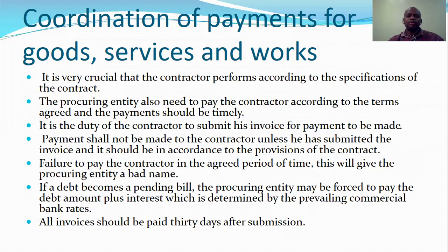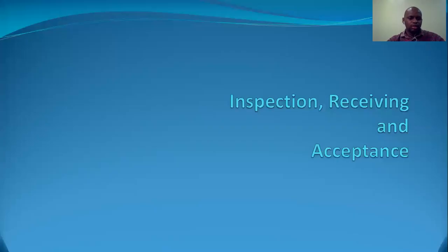If a debt becomes a pending bill, the procuring entity may be forced to pay the debt amount plus an interest, which is determined by the prevailing commercial bank rates. All invoices should be paid 30 days after submission.